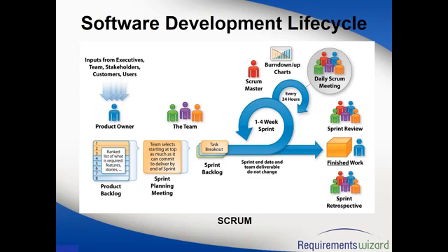Okay, so as you said, whether the project is a success or a failure, you need to do the lessons learned at the end of the project. Before you close the project, you have to conduct the lessons learned meeting, where you invite all the team members and discuss what went well so that you can repeat it, what did not go well so that you don't repeat it again, and learn the best practices and share them with the other teams. Exactly the same concept is here.